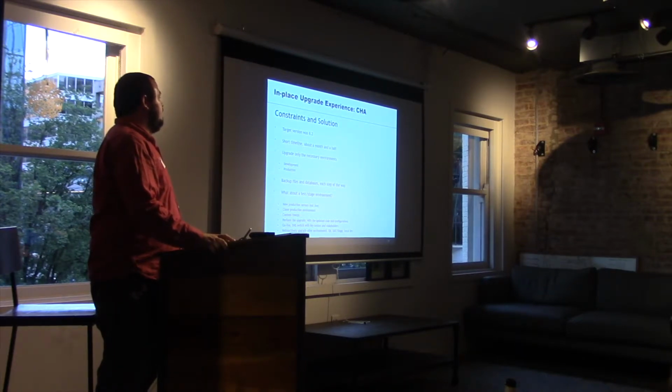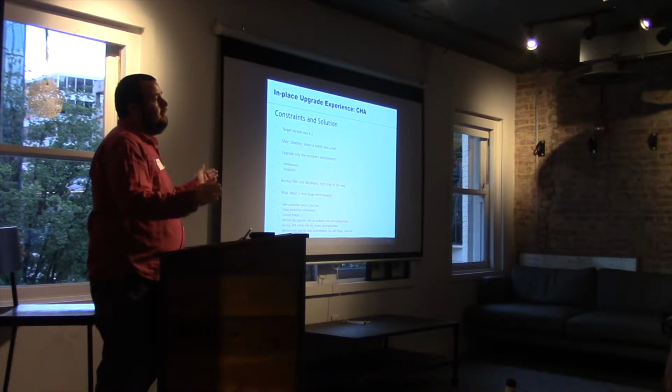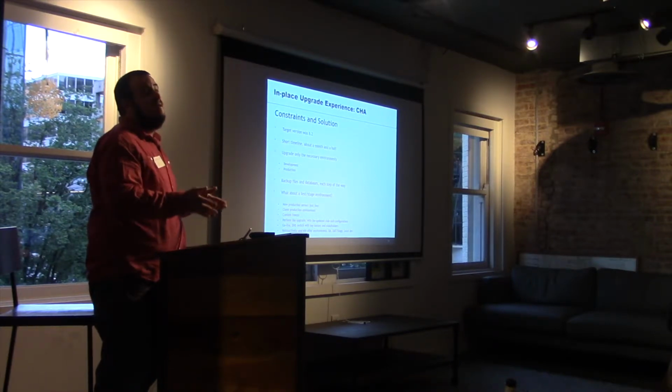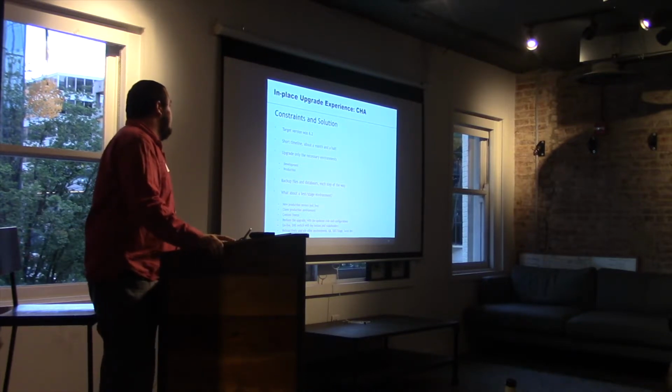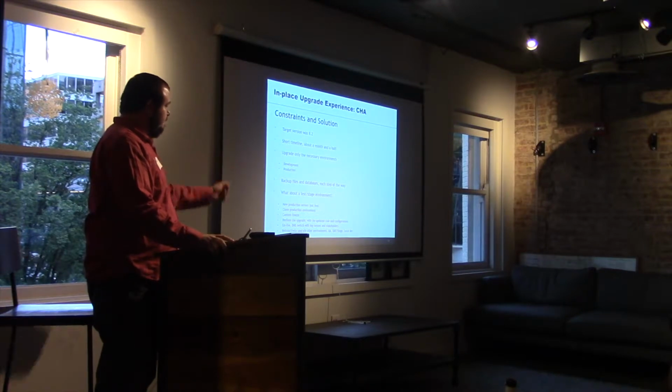The timeline was a constraint, about a month and a half, maybe 2 months. We were able to consolidate this, and I'll talk about it in more detail, by minimizing the number of environments that we needed to upgrade to get to a live upgraded version, specifically development and production.